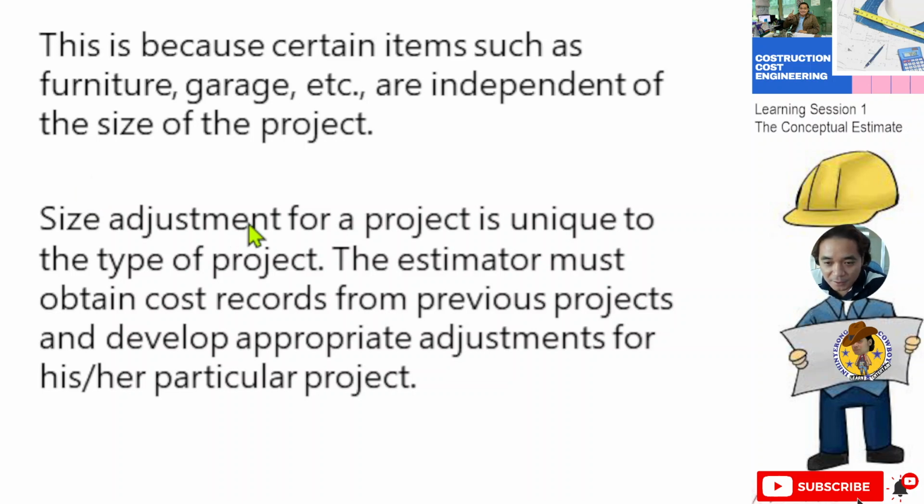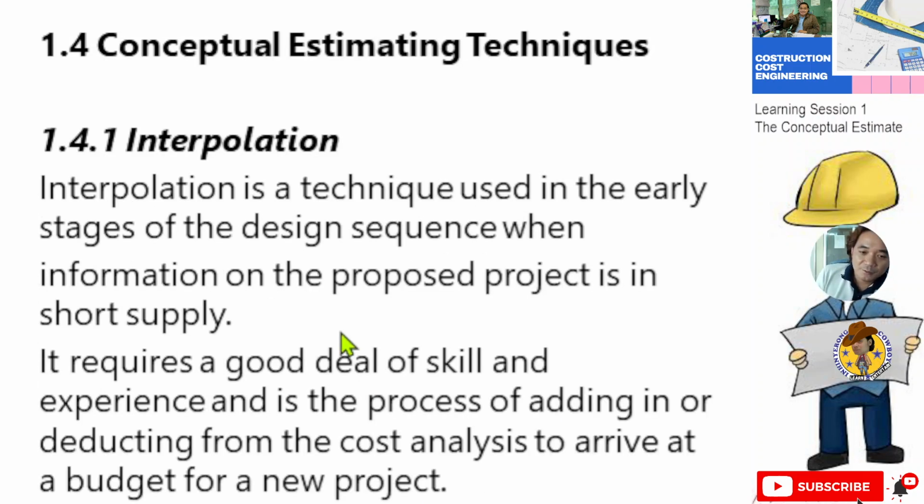Size adjustment of a project is unique to the type of project. The estimator must obtain cost records from previous projects and develop appropriate adjustment for his or her particular project. Then we have the conceptual estimating techniques. Number one is interpolation.